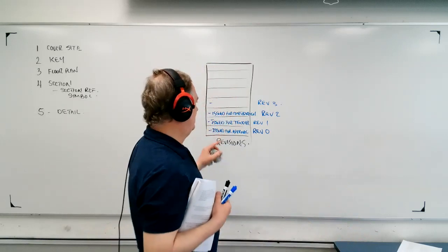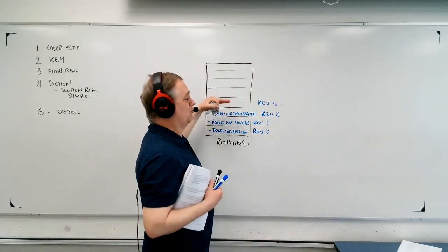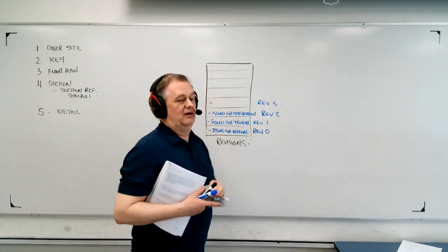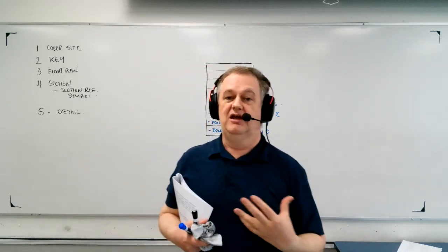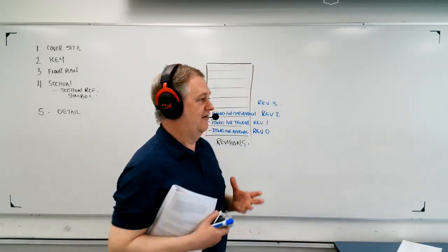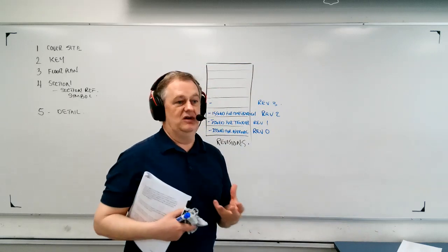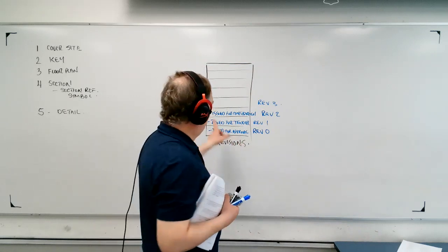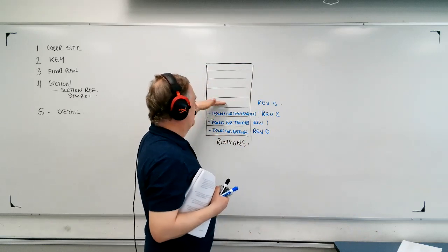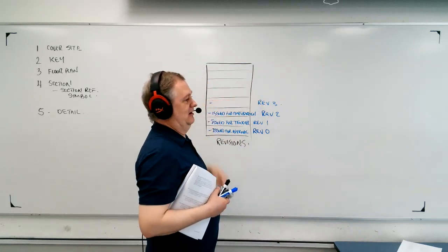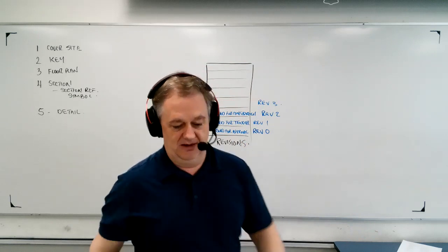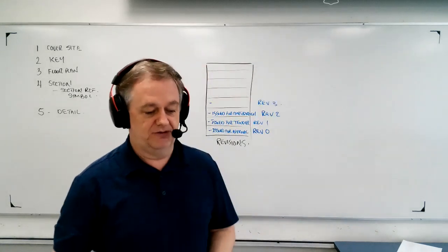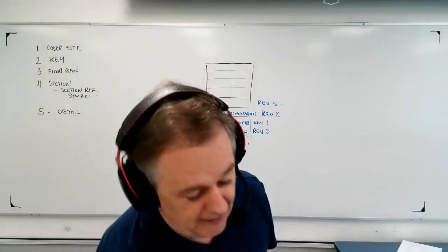And everybody needs to make sure that they're working on the most recent revision, in order that when you communicate back and forth, you're going to have some continuity, and you're going to be at the same place, on the same page, as we say. So everybody needs to be working off of the same revision. And that is a responsibility that definitely falls, first of all, to the architect.